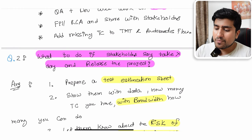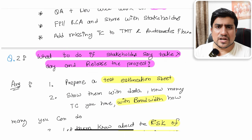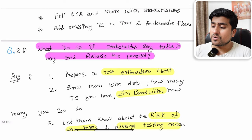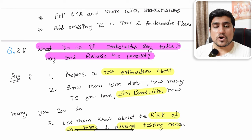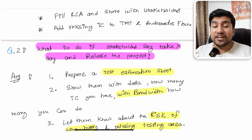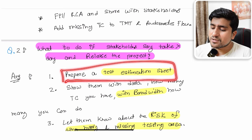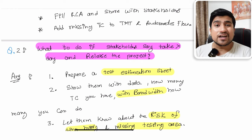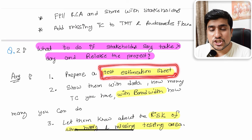Question number two: what do you do if stakeholders say there is very limited time to release a product — for example, just one day? This is a very common scenario where your product manager or designer says there is very little time and asks you to release as soon as possible. What you need to do is prepare a test estimation sheet. I've seen people miss this answer — they forget the test estimation sheet entirely.